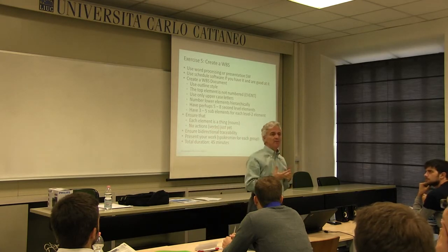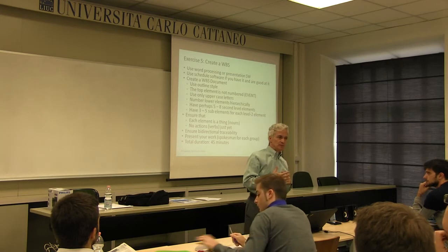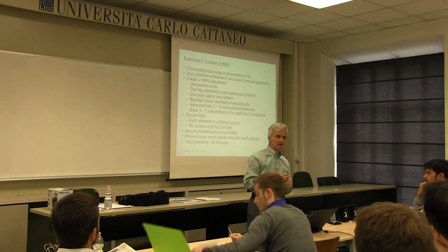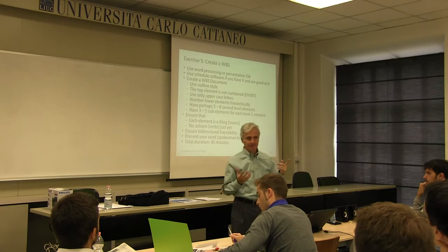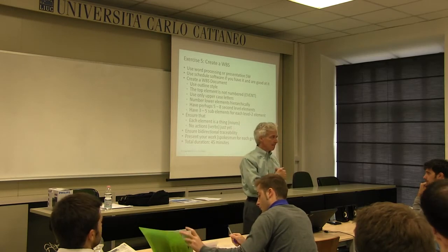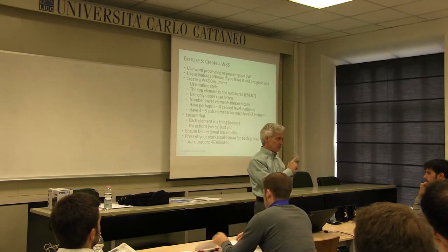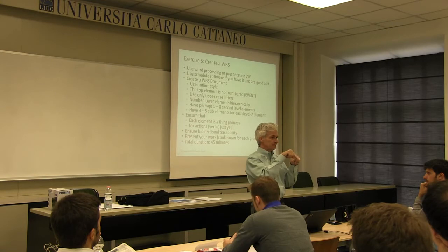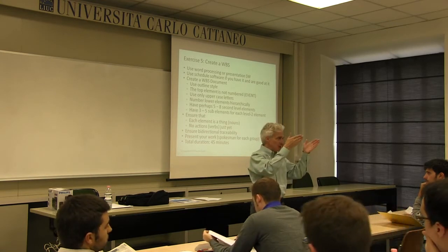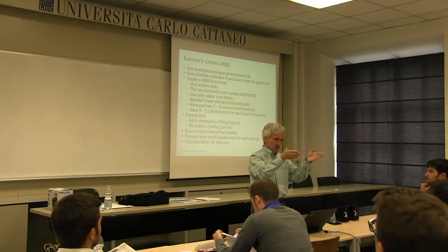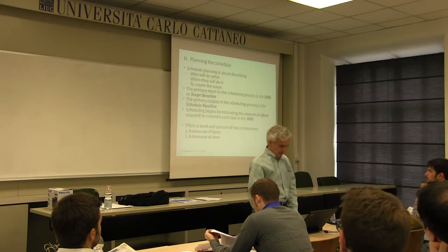The primary input to the schedule process would be what? Primary input to creating the schedule. Selecting dates, close, but what is the input? The scope. Scope, which is known as the WBS. All right?